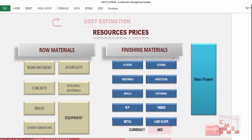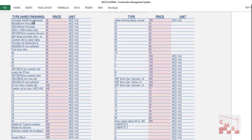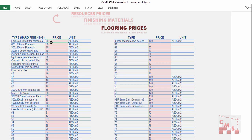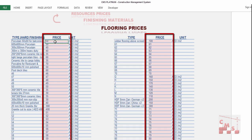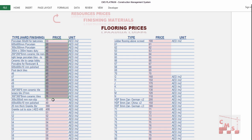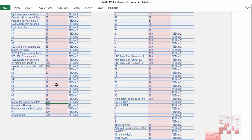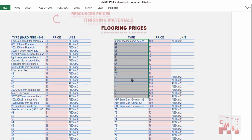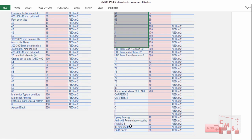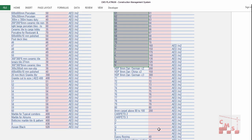Now we start entering finishing material prices. For floors, all finishing materials already inserted in quantity surveying appear here. Insert the purchasing price — for example, 50 dirhams per square meter for porcelain. Enter the prime cost per square meter for each material separately. Marble will have a different price. Fine flooring, carpets, epoxy paints — whatever materials were inserted in quantity surveying — you only add the purchasing prices here.